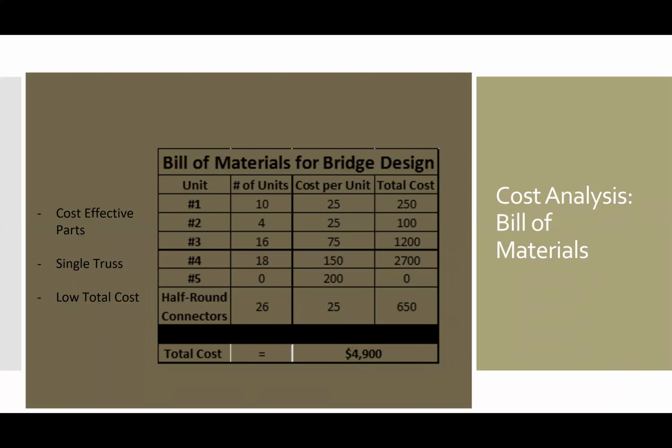Now, they did not include a Gantt chart. You will. So there is no Gantt chart example for me to show you, but they did break this cost into 2 slides. And so I kept both of them in here so that you could see 2 different ways of doing the cost. One is to provide a bill of materials. And you could include a bill of materials for the project that includes those 4 different categories we talked about. So you have all the technology that's required, you have the furniture that's required, you have the decor elements, and you have supplies. So you could put in the table that is the budget and speak to it in table form like this.